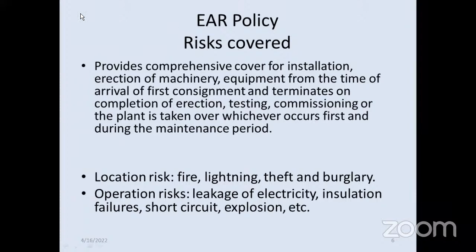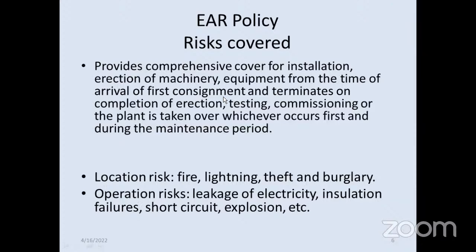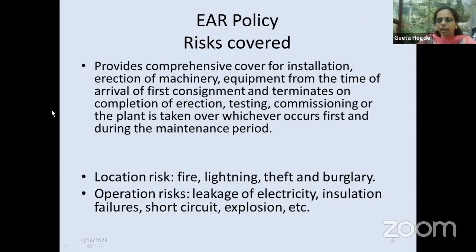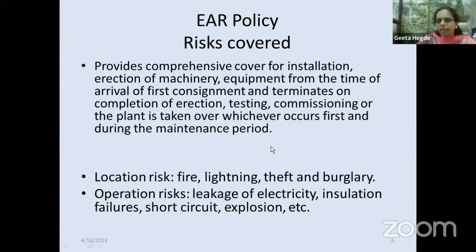But is machinery insurance an all risk policy or a named policy? It's a comprehensive cover for installation and erection of machinery equipment from the time of arrival of the first consignment and terminates on completion of erection, testing, commissioning, and the plant is taken over, whichever occurs first. So either the plant is taken over, and during the maintenance period also, if that is opted for. Cover starts from arrival of the first consignment, and ends on completion of erection, testing and commissioning, or when it is taken over.